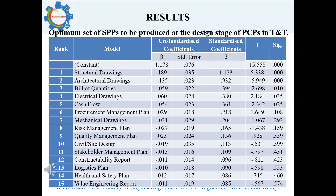From the standard multiple regression analysis, we determined the most critical plans to project schedule success and populated a table giving the 15 most significant subsidiary project plans in order of importance: structural drawings, architectural drawings, bill of quantities, electrical drawings, cash flow, procurement management plan, mechanical drawings, risk management plan, quality management plan, civil and site design, stakeholder management plan, constructability report, logistics plan, health and safety plan, and the value engineering report.